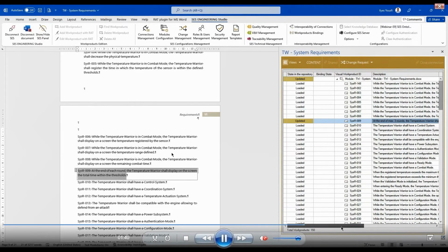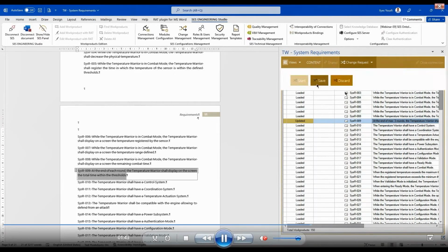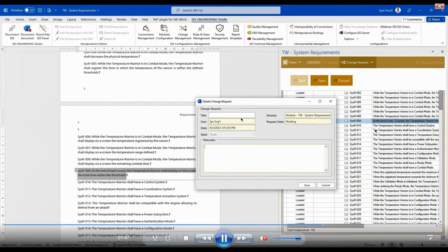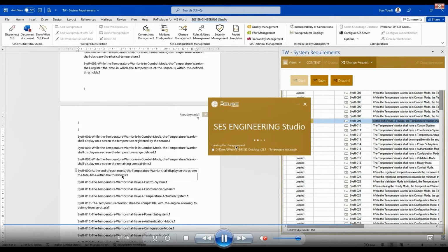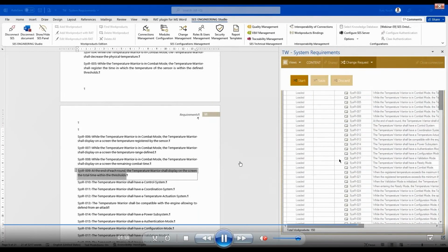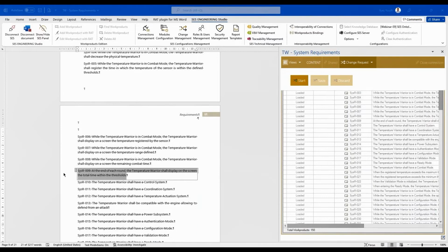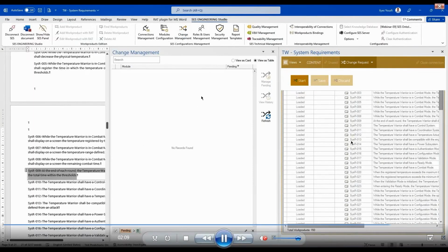In this case, since we're in change request mode, it's not synchronized because so far it's not considered an approved change. It has to be approved to be propagated back to the source. So we're creating some kind of asynchronous situation until the administrator accepts the change request.